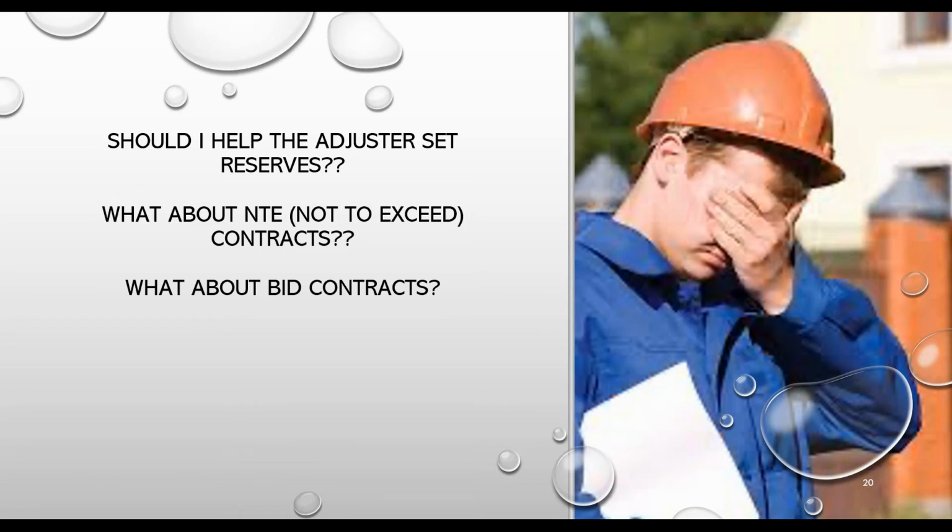Your first day is mobilization. That's going to be a little lopsided because that's usually expensive, depending on how far you're traveling. Your second day is pretty chaotic because you're getting everything lined up and trying to figure out how big the building is and getting your sketch done and this, that, and the other, sort of like the slide with the street signs going in it. By your 3rd day, you should be in calmer waters. Things should have leveled out a little bit, and your 3rd day should give you a true idea of what your burn rate should be.